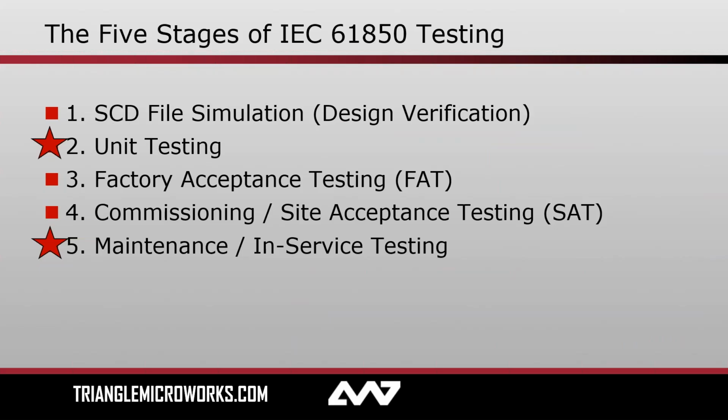And then finally, 5, maintenance. So once we commission, we get to walk away, but not forever. So maintenance, periodically, maybe a device needs to be replaced or upgraded. In service testing, so periodically, maybe every 1 year, every 5 years, every so often, we need to make sure that our system is still functioning correctly based on rules and regulation in the location that we're at, or even brownfield. So, updating, adding a new bay, so on. Testing requirements change when you're working on a live system.